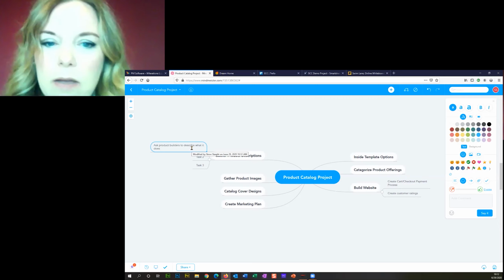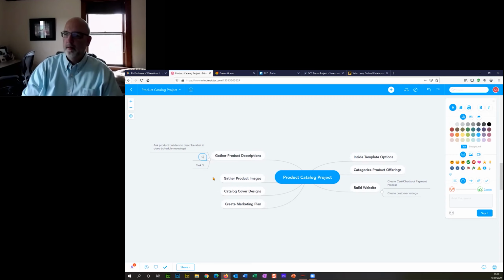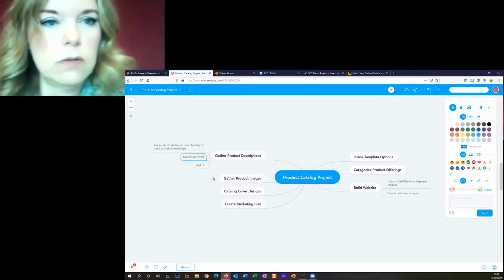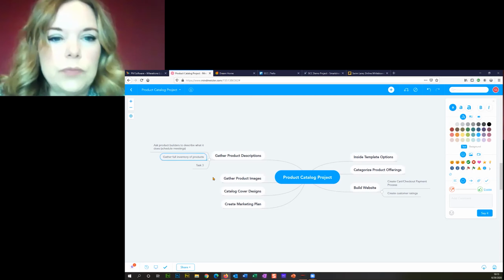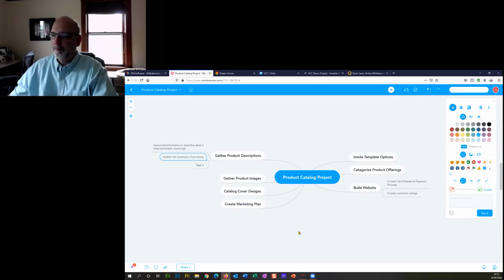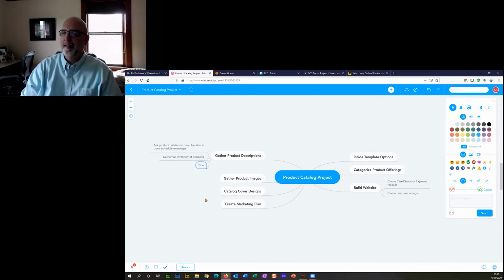We also have get inventory of products. Kind of confirm, like get inventory and confirm inventory. So both of those. Okay, and that's a good idea because maybe somebody's working on a product, but they're not ready yet for prime time. You put it in your catalog and everybody's asking about this great whiz-bang product and it's not ready. So confirm availability, I think, is that one way to?